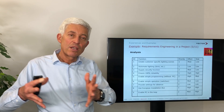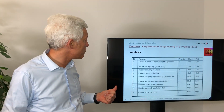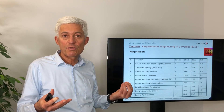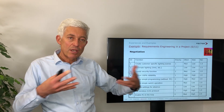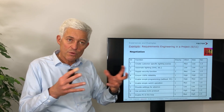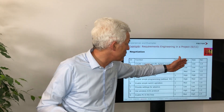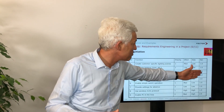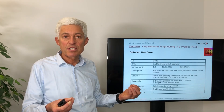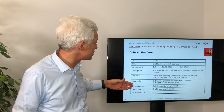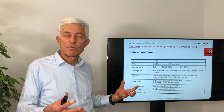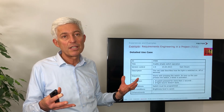We have to see whether the requirements fit our budget and the overall package we want to sell. Maybe the iHome will be sold through a distribution channel with a specific pricing constraint, and to fit the pricing we have to scope the requirements accordingly. We not only look at the previous analysis but also map requirements to certain releases. From this negotiation onwards we can go into more specific use cases — giving details not only on versioning but also on underlying assumptions and the previously mentioned pre- and post-conditions, which are quite important for testing and validation of each requirement.